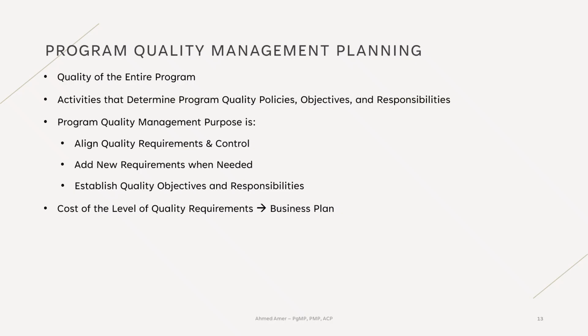Quality is a variable cost across all components, and the program quality management plan should reflect that. It's often beneficial to analyze quality activities across the program to identify opportunities to combine tests or inspections and reduce unnecessary costs. Without coordination, multiple components might test the same deliverable several times, resulting in avoidable expenses. This is why it's beneficial to take one step back and check the big picture of how things can work for the program, not only for its components. This helps as well, saving the program team time and effort.